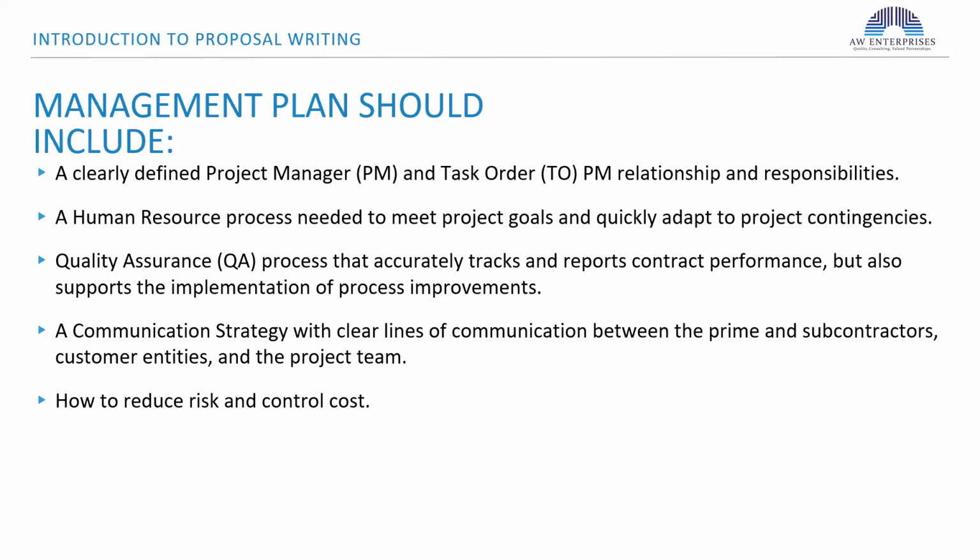So make sure of the type of contract that causes you the most risk. Again, that's the firm fixed price. And on the other hand, in the opposite direction, are the cost plus fixed fee type contracts, where the government reimburses you for all expenses incurred during the performance of that contract.